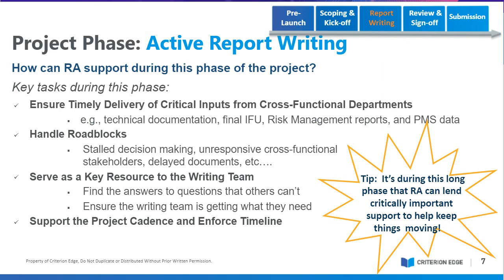We have been handed basically raw data from PMS on just a few occasions, and that's a huge slowdown. And actually, we usually push back and say, you're going to need to put this in tables for us. We don't have the time to do that. So that's another hint as well, to get your PMS data cleaned up and ready to drop right into the CER. Regulatory affairs can handle roadblocks probably better than anybody, or is well positioned to do it.